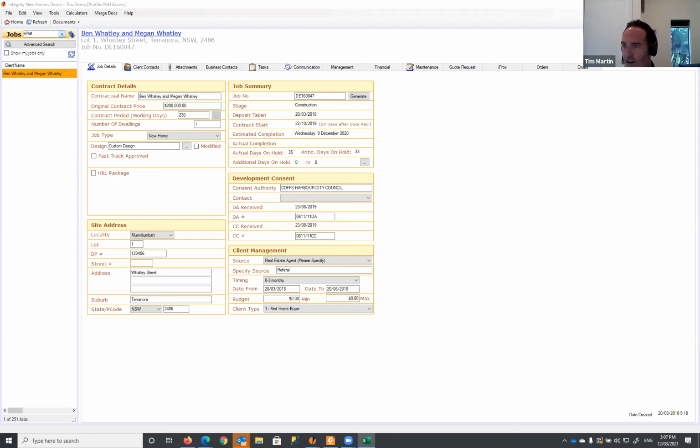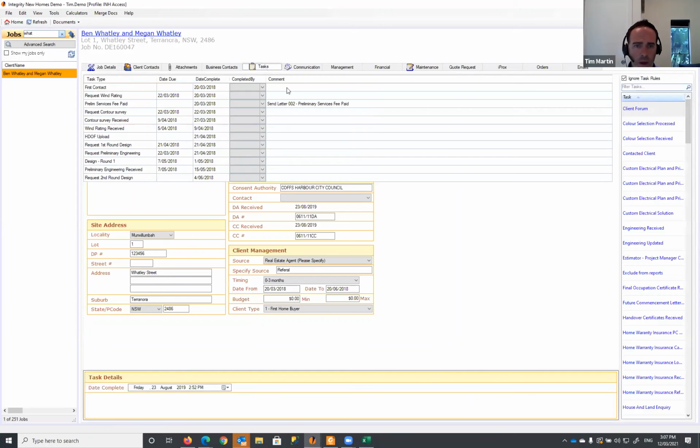We've got 20 working days for New South Wales and Queensland and WA. South Australia is also 20 working days to start the contract, but we're using an addendum G in our contracts because the HIA contract doesn't specify that. Victoria is 21 calendar days. And ACT, just to be different, is 15 working days. All right, so we've got some updates coming to Gyro soon, which will have those new dates for Victoria and ACT coming out.